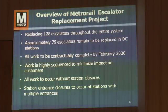But to close off the street during the day, and where we have to park because the trusses would have to be offloaded and put back on. The only time we need to have the station closed is when we're lifting and dropping equipment down into the station. Once we get it in the wellway, we're behind our barricades and we're working. So the opportunities we would take on the weekend would just be for delivery, the movement, and the installation of the new trusses, or taking out the old trusses. I don't think it's worth exploring shutting down half of Connecticut Avenue over the weekend. I mean, we did look at that.